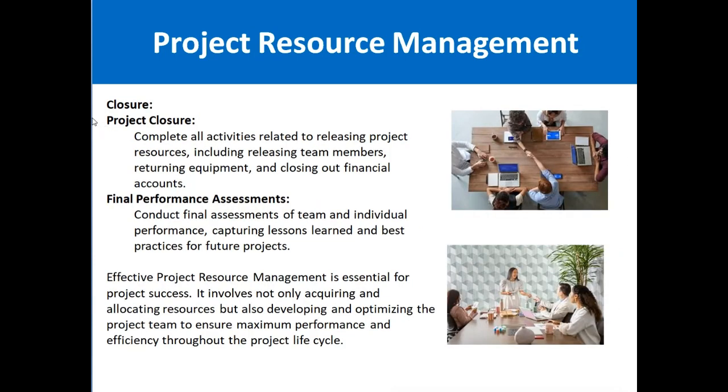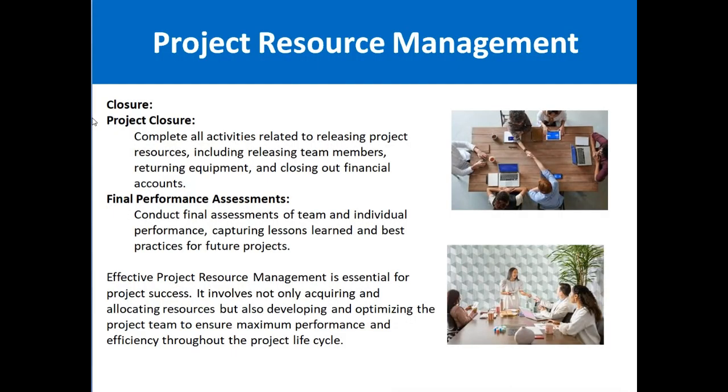Next is the project closure. Once all the activities related to the project are completed, we have to obtain the project closure sign-off from the customer, release the resources, return the equipment, and close out the financial accounts. It is a complete phase in a project, in which after getting the sign-off from the customer in written format, we release the resources and inform the functional manager that we are releasing that resource to him, and he can utilize that resource accordingly.